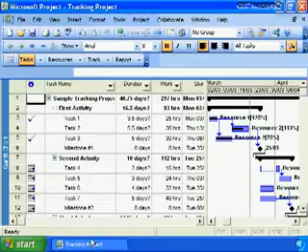Here we have a Microsoft Project plan that I've already created and already has begun to have task tracking done. You can see here in the Gantt view we have 3 tasks where there is a black bar going through the middle of our Gantt area. And the black bar is indicative of time tracked. So we see this task is complete, the black bar is all the way through. Task number 2 is in process, the task bar does not complete to the end of the task, and task 3 is also complete.